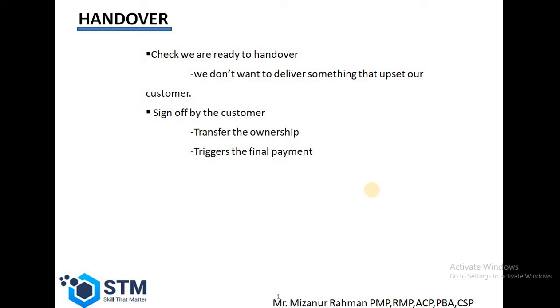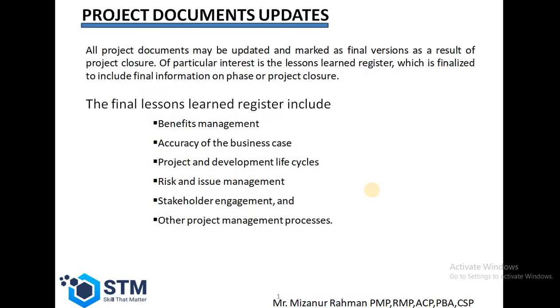We don't want to deliver something that upsets our customer. Then another thing we have to do is get sign-off by the customer. That means we are going to transfer the ownership of the product to our customer. That also triggers the payment, the final payment of the project.